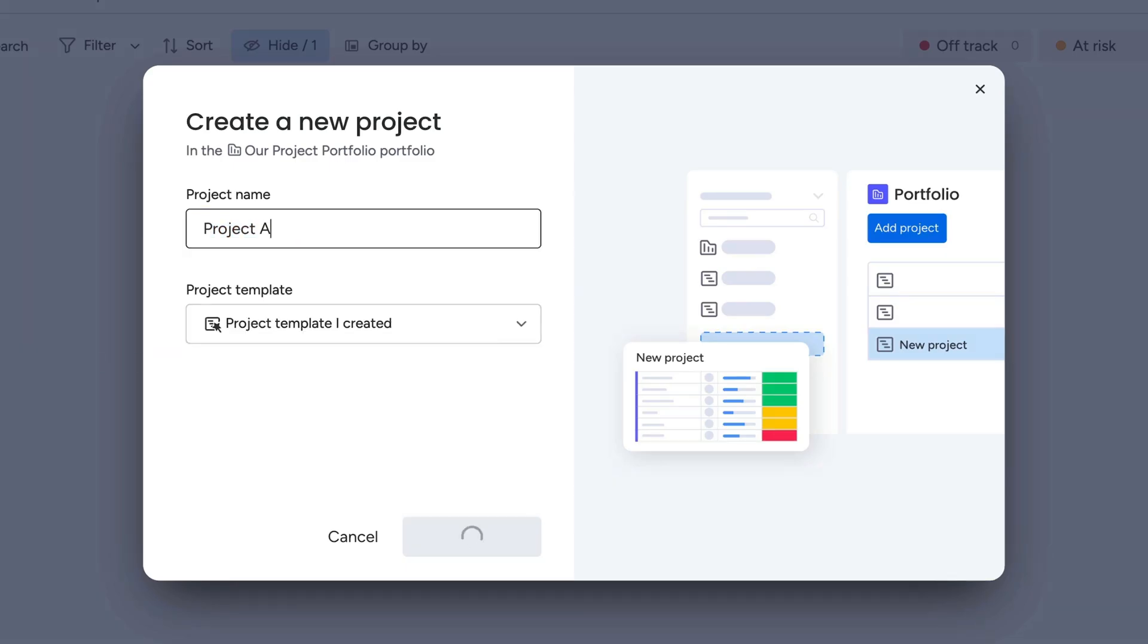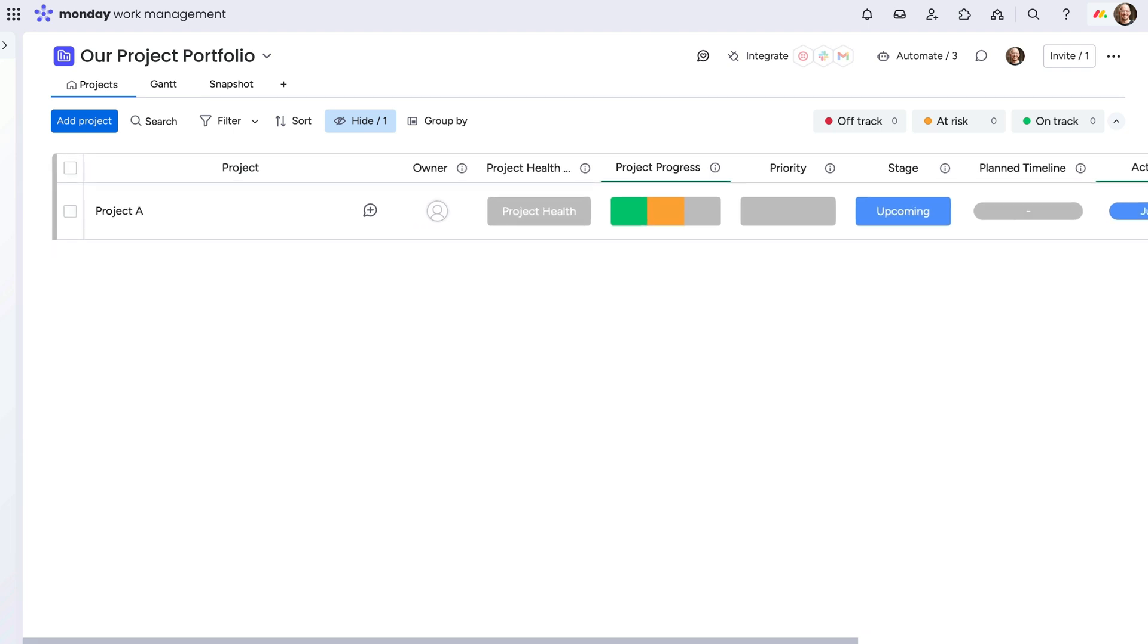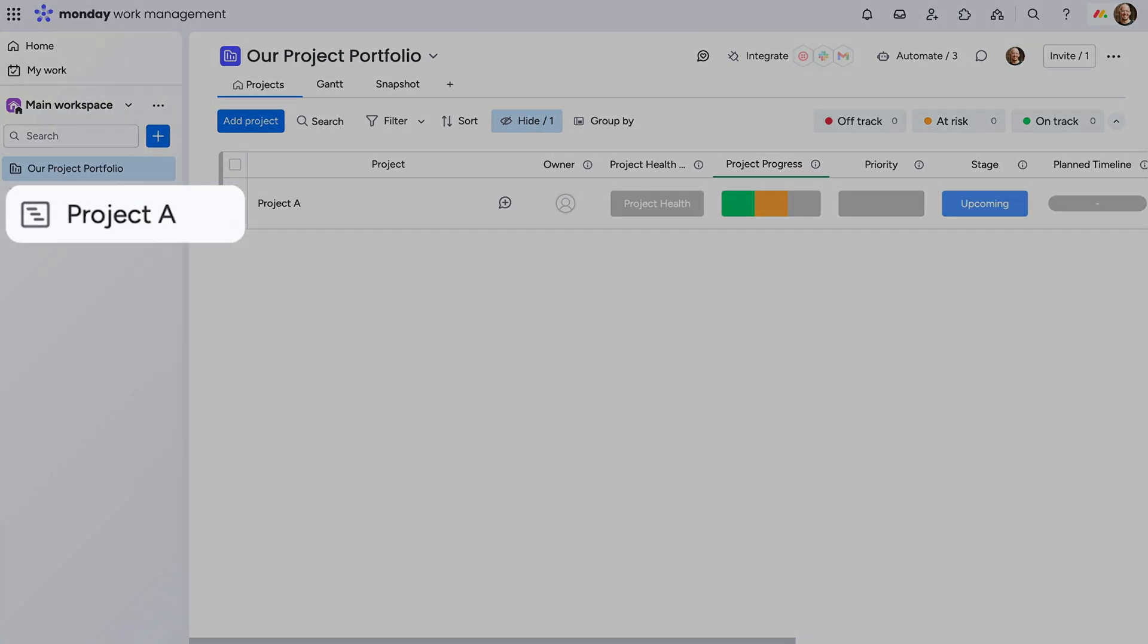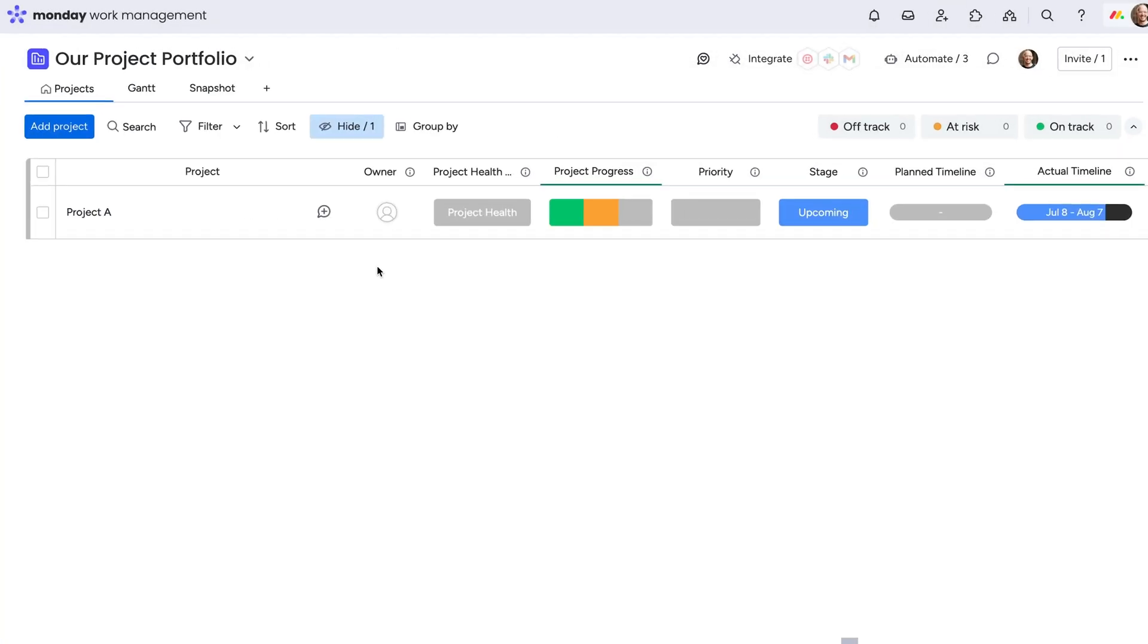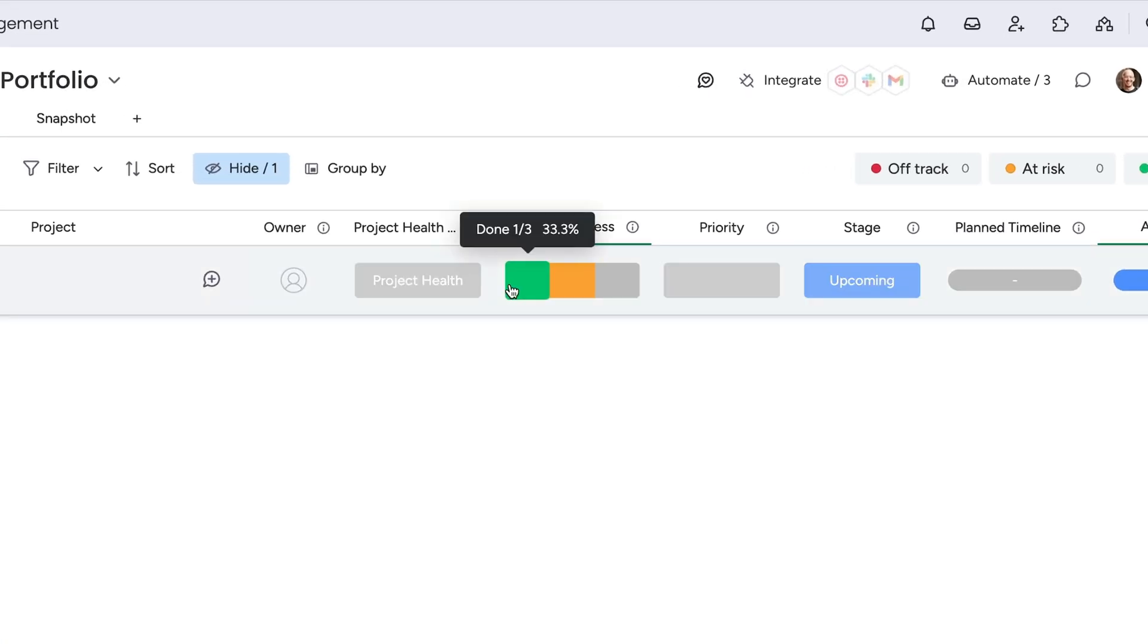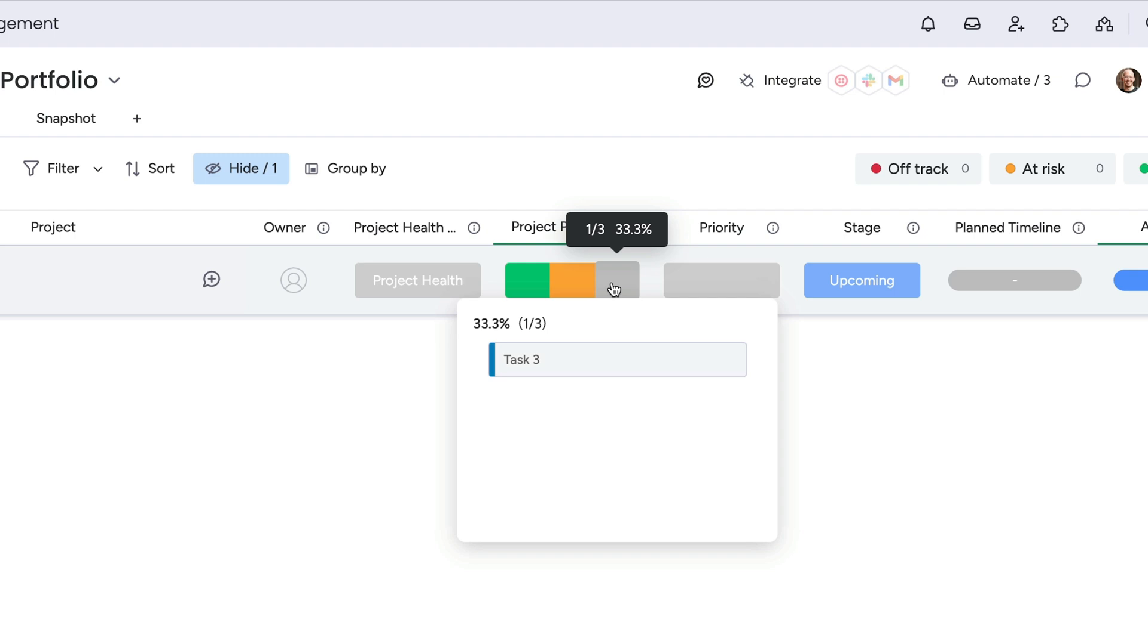Once added, it'll automatically connect a high-level item on the portfolio board with the project's name and a new low-level project board. The parent item will then be connected to every item on the low-level project board with no manual work needed.